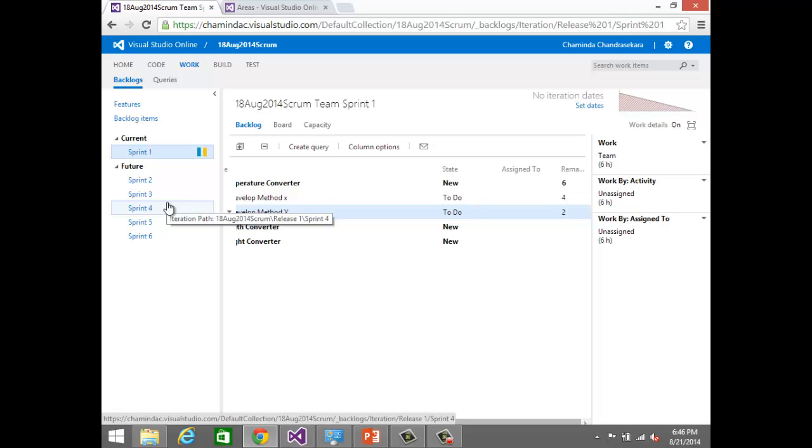That relative sizing is used to understand the entire team's speed of achieving things. That is used as a measurement in a later stage of the project, right? After 2-3 sprints, you find out the real speed of the team, that is called the velocity of the team, and then you plan work accordingly. So we will have to enter certain values and then see, right?